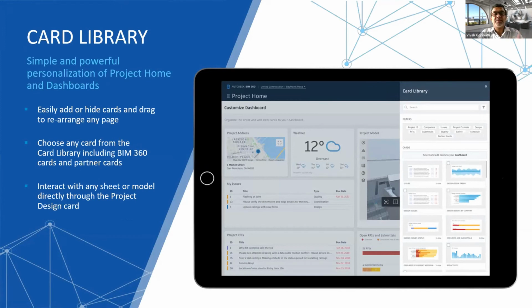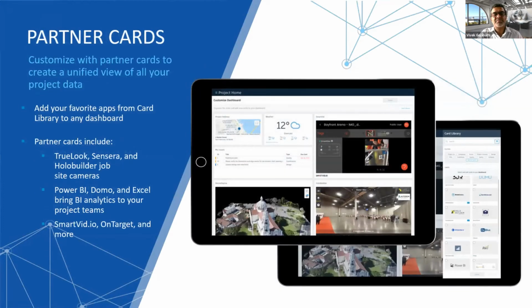Also, partner cards, basically for integration, which help to capture or retrieve the data from BIM 360 and collaborate with externals. The same way, in reverse. For example, take an integration app, Holo Builder. It helps to monitor the progress of construction on the site with specialized cameras which are put on the site. It will capture the data live, which will get synced onto your BIM 360 model. So you will have a BIM 360 model on the cloud, and you will have the live pictures coming in on the feed, which will get integrated and give you an exact understanding of how the project is. This is a small example which I was just pointing out.